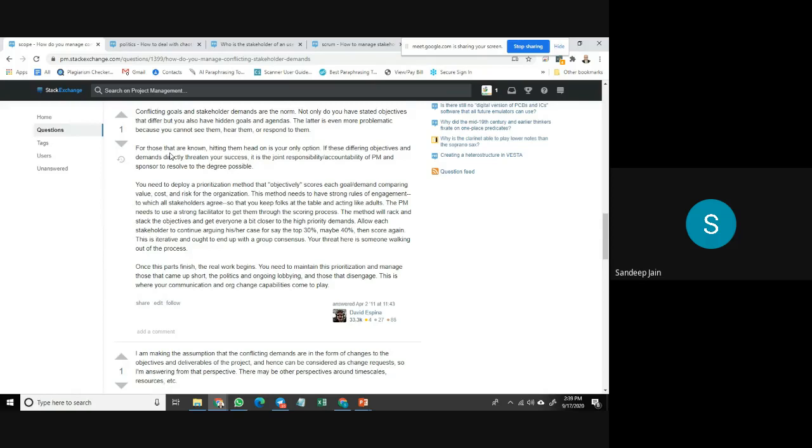Assign a numerical priority order to each and every requirement, and then see which one has the higher priority. But obviously, everyone will want their goal to be achieved, right? So there'll be a discussion in the room, and people are free to jury over it. If two people are conflicting, then the rest of the people in the room are going to tell them which one is a higher priority.